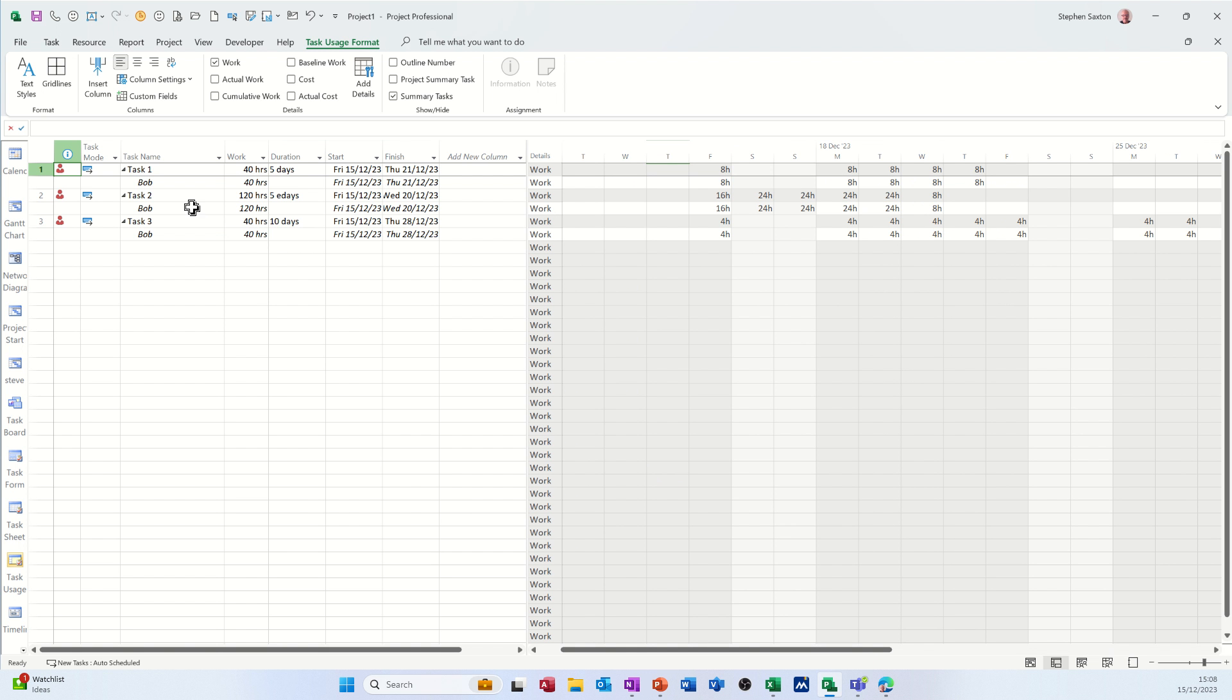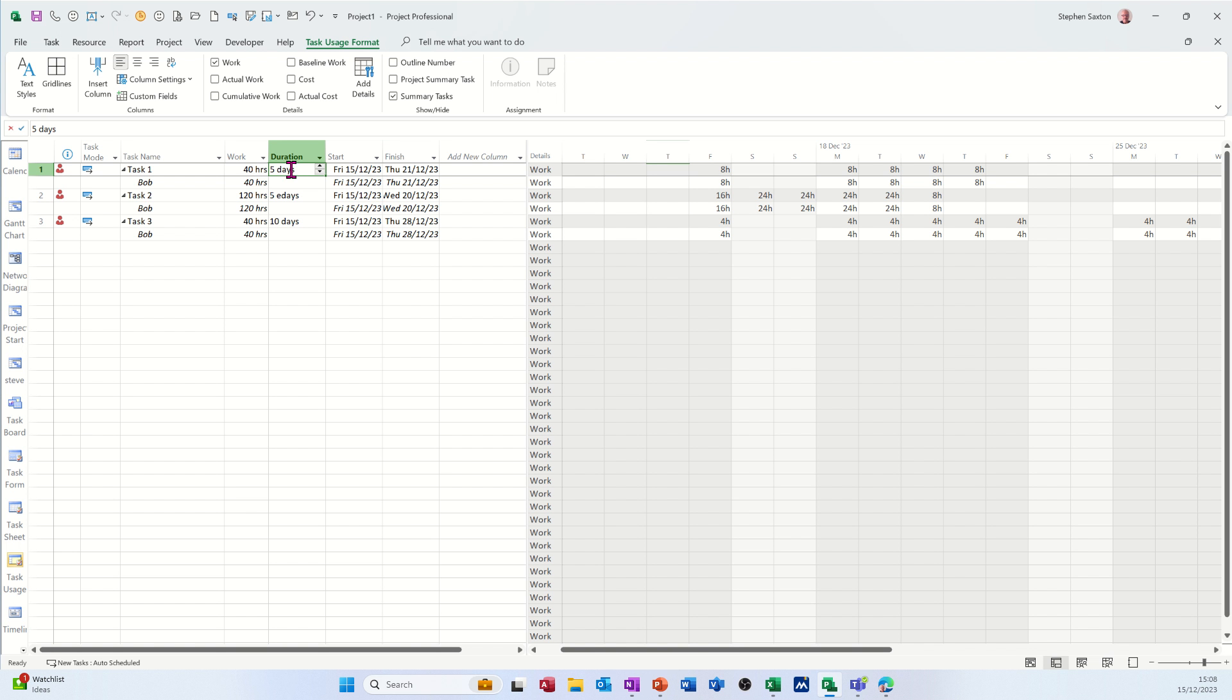So that's what the difference is between just normal duration, e days, and if you fix the hours. So you've got effort, you've got actual physical time between two dates, and then you've got the duration of the task which does not include non-working days like Saturday and Sunday. So hopefully this video has been of use. Thank you for your time, I'll catch you on the next one.